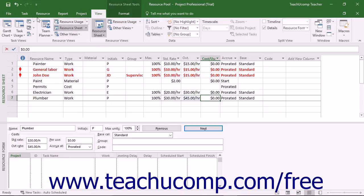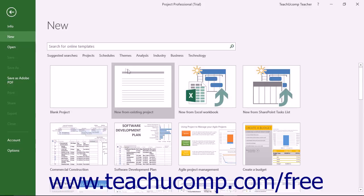After saving these changes, the users of the linked sharer projects will have the changes to the resources available to their project files after you close the shared resource file.